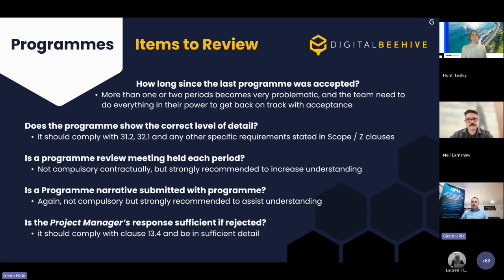Is a program review meeting held each period? Now, this isn't compulsory, not like the early warning meeting that Lesley's about to talk to us about, but if you were to do such a meeting, then you're presenting the program, talking to the other party, explaining what things have changed, explaining what the program is showing, and that will help speed up the understanding and therefore hopefully speed up the response and the stronger likelihood that it can actually be accepted.